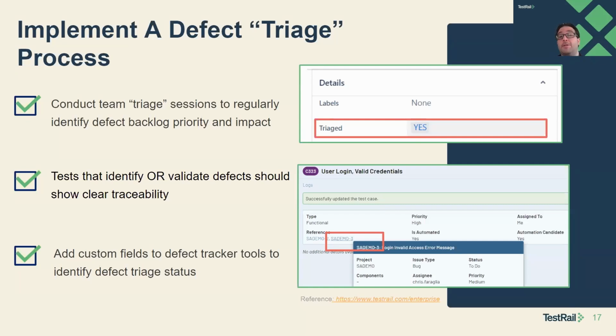Because your bugs are your risks. It's kind of like the risk register for the product. We know all the things that are not working right. So we should be doing this regularly with a lot of engagement in a very streamlined process to be able to manage this. One of the things I used for a long time, and I was a Jira user for a long time, is what the screenshot here shows: adding a custom field in Jira on a story defect. You can put it on whatever. It mainly applies to defects for triage.